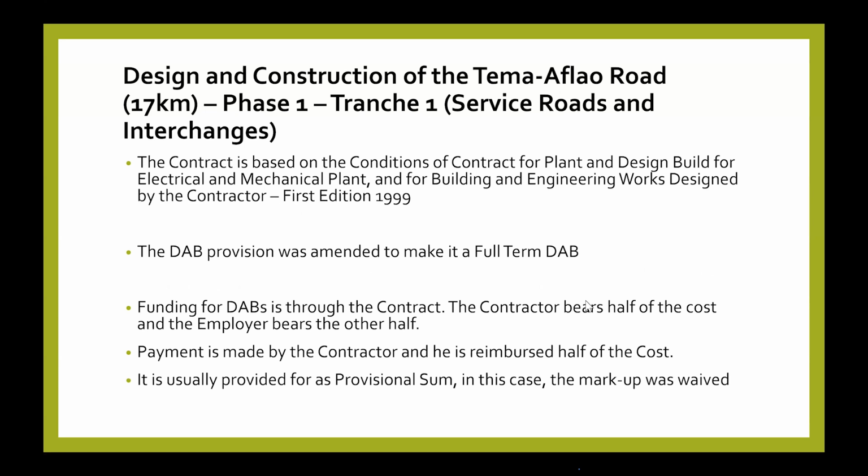So we come to our case study, the Tema-Aflao project. The design build project is a yellow book. And as I said earlier, the yellow book is an ad hoc DAB. But during negotiations, more or less one of the parties was more impressed to have a full-term DAB in this contract. So we more or less imported the provisions in the red book, which is for full-term DAB, for this project.